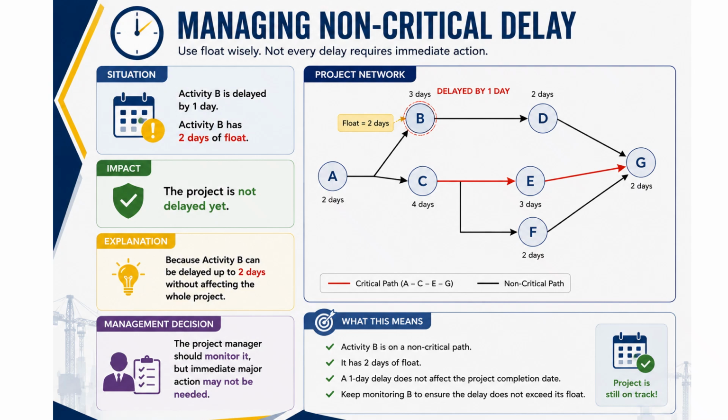The delay is still within the float. In this case, the project manager should monitor the activity but may not need to take a major corrective action immediately. This is why float is useful. It gives the project manager breathing space. However, the project manager must still be careful. If the delay becomes more than the available float, then it may start affecting the project completion date.